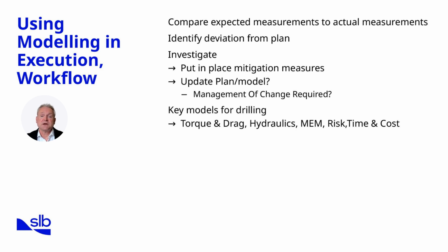This process is closely tied to management of change. Any adjustment to the plan must be communicated, documented, and approved to ensure operational integrity. The key models most frequently applied in execution include torque and drag, hydraulics, mechanical earth models, and risk frameworks. Time and cost models are also updated continuously to track progress against plan. By embedding modeling into execution, the forecast becomes a living tool rather than a static plan. Next, we will review our objectives to close this submodule.